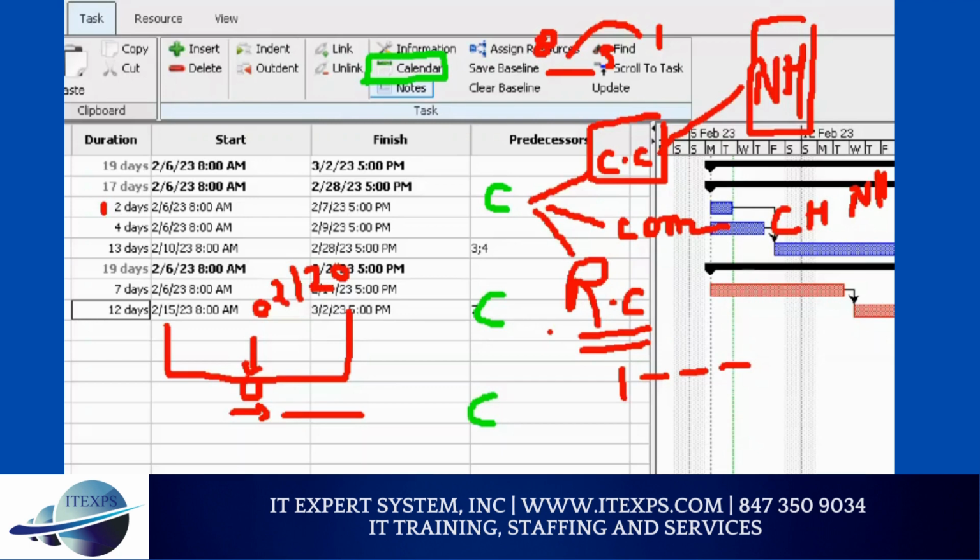I believe in Australia or somewhere, they only work 4 days a week, in certain parts. So then their 1 week equals 4 days. So the equation is different, because there is the company calendar. Make sense or no? Company to company, it can differ. So all those things you need to consider. If the company takes more vacations, has more days off, or works less time, will your duration increase or effort increase?